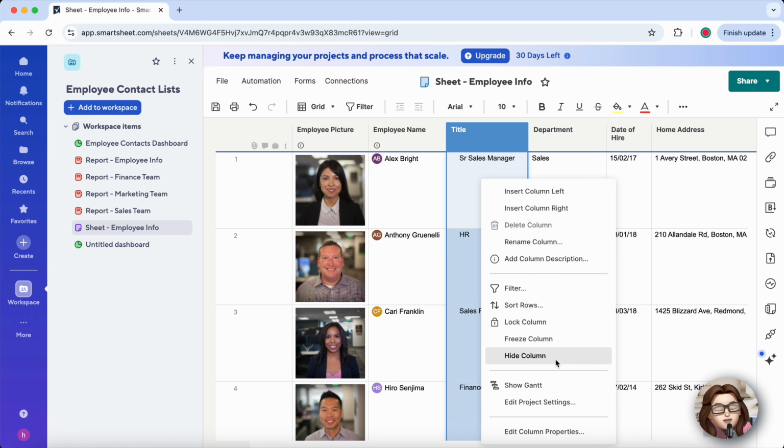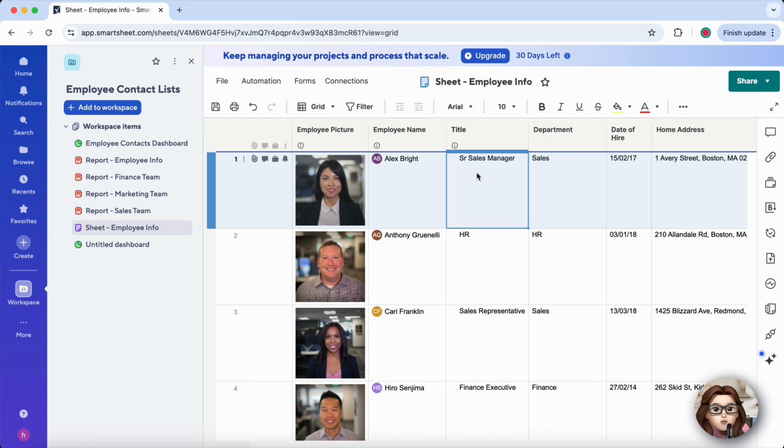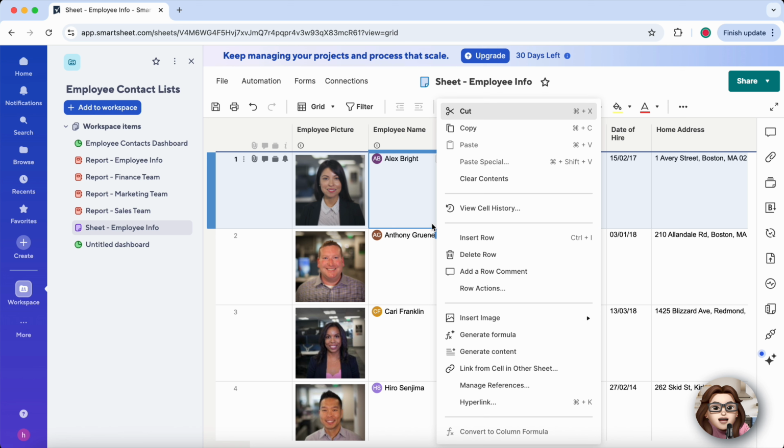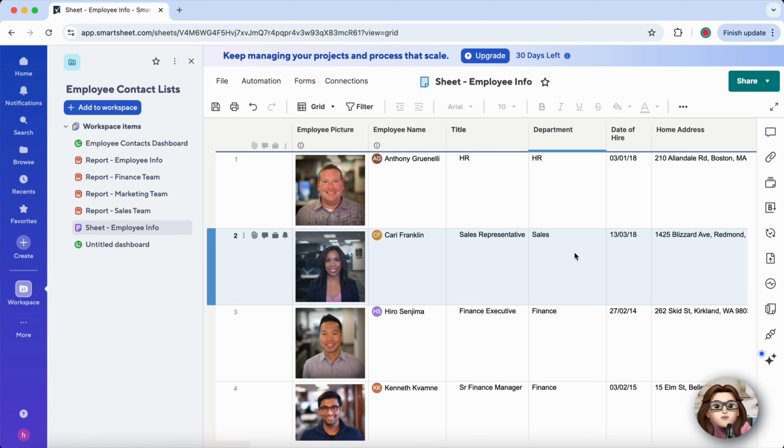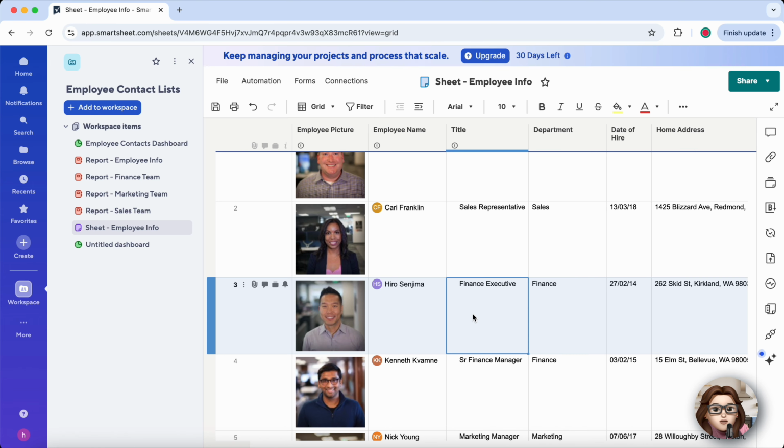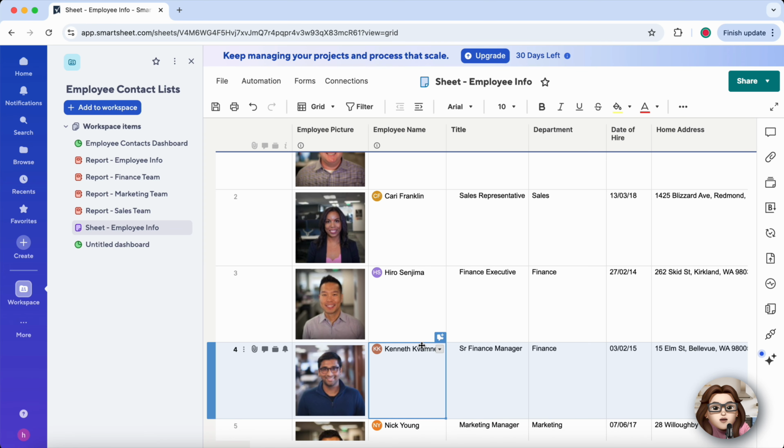To organize tasks, use the indent and outdent buttons in the toolbar to create subtasks. If you want to attach files or add notes, just click the paperclip or comment icon on the row. For even smoother workflows, use the Automation tab to edit or create rules that handle repetitive tasks for you.